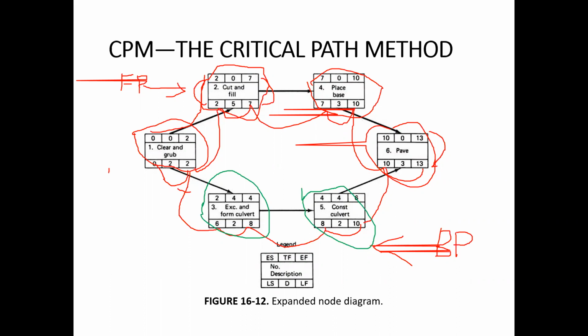So this is called precedence diagram, yeah? Yes. So in the activity on node network diagrams, there are two approaches. So one of them is this approach, and another one is the precedence diagramming method. Okay. So in the precedence diagramming method, we do one step more. We try to establish the lags between the network. Activity precedence diagramming is the same as this.